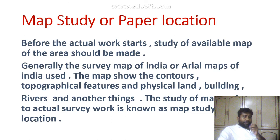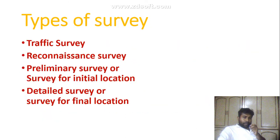The map shows contour and topological features, physical land, buildings, rivers, and other things. The study of maps prior to actual survey work is known as map study or paper locations.